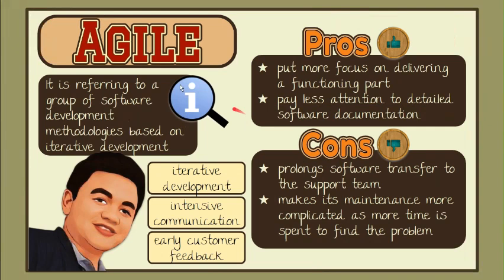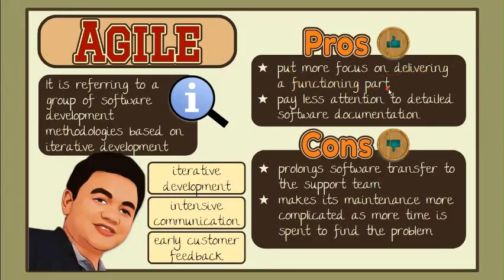These shortcomings have given room to alternative approaches and models. This brings us to the next methodology called Agile. This is actually referring to a group of software development methodologies based on iterative development. At the heart of Agile methodologies are iterative development, intensive communication, and early customer feedback. It means Agile is about working in close collaboration both across the team and with the customers. The models of this group put more focus on delivering a functioning part of the application quickly, paying less attention to detailed software documentation and more to software testing activities. This fosters quick development but considerably prolonged software transfer to the support team, making maintenance more complicated as more time is spent finding the problem when there's no detailed software description.